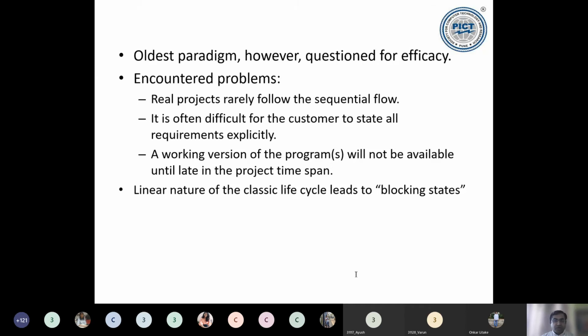That's the problem, because the customer will always be anxious to see what is happening to my software, how much development has been done by this team. Even if they are giving you something, they would like to have some kind of reports or feedback. What is being done? Tell us these functions are done, because we say that based on the work completed, they provide you the money. Okay, so funding or capital will be given as and when you say, okay, this is done, this is done, this is done. So as milestones are achieved, the customer keeps on paying. Okay? So there is a phase-wise payment performed by customers.